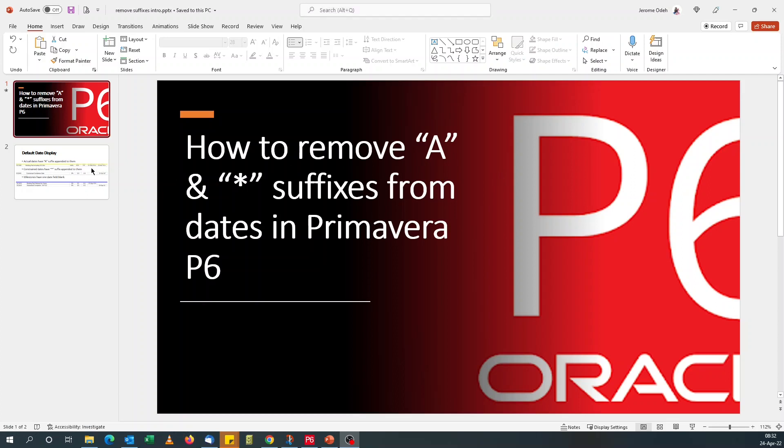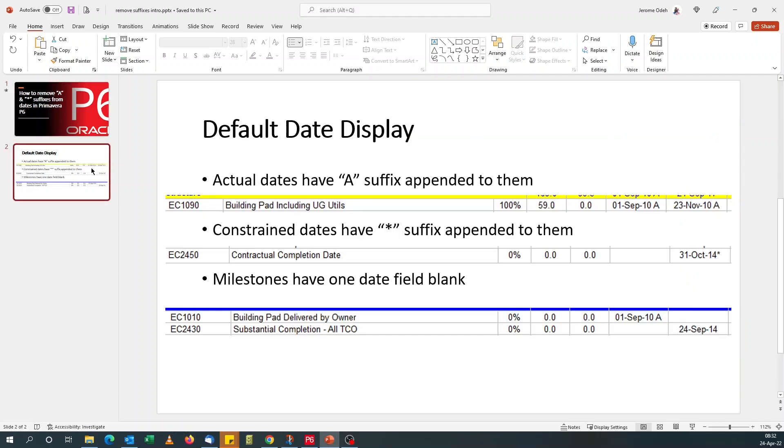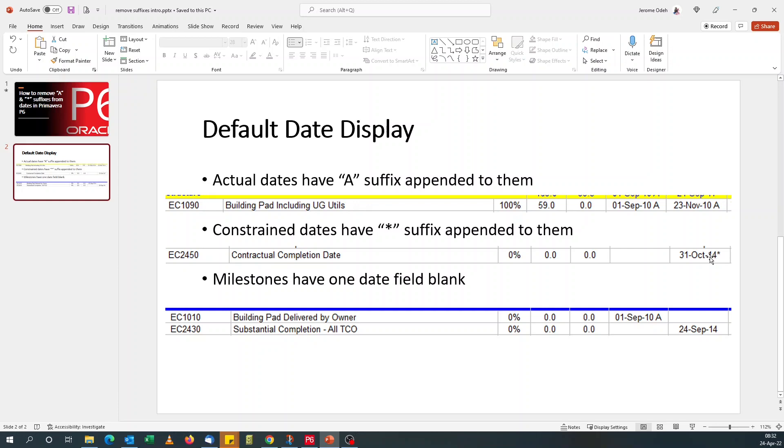If you're very familiar with Primavera P6, you will know that actual dates have got the suffix A appended to them and constrained dates have got the asterisk suffix appended to them. That's good because it distinguishes for actual dates between activities that have not started and activities that have started or completed.